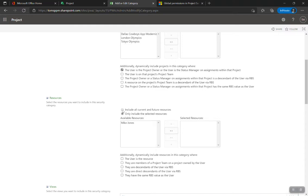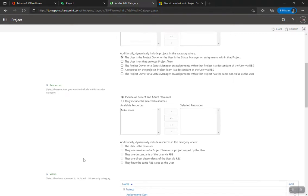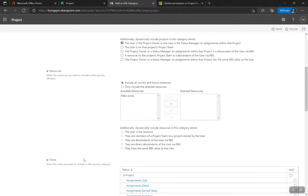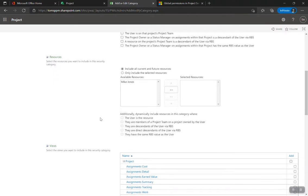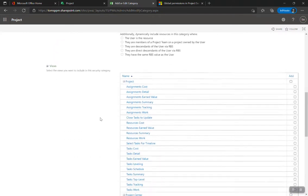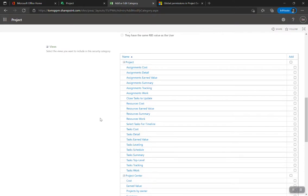For resources, I'll include all current and future resources. You want project managers to be able to assign resources. If you want more granularity you can restrict which resources they see, but I allow them to see everything and let them select the right one — makes it really easy. Then: what views do you want this category's permissions to apply to?